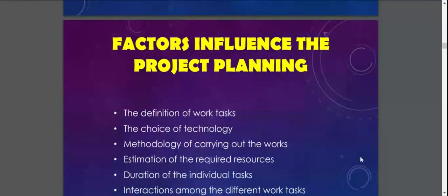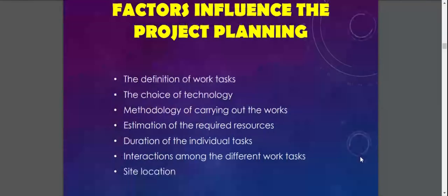In terms of the factors which influence the project planning, of course there is the definition of work tasks, the choice of technology, the methodology of carrying out the works, estimation of the required resources, duration of the individual tasks, interaction among the different work tasks, and site location. These are all the factors that will influence the project planning.